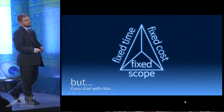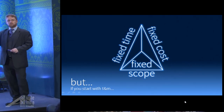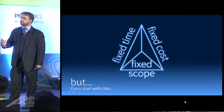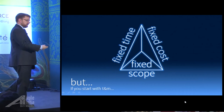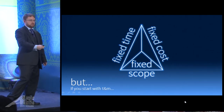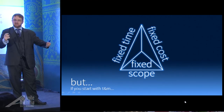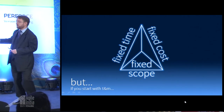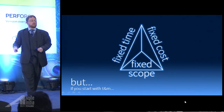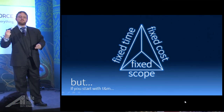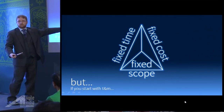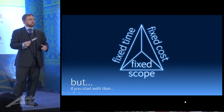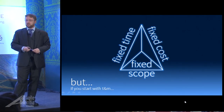There is a silver lining. If you start with time and materials — do a small T&M piece of work, capped to a couple of weeks or a couple of months — to truly understand the business and the intent of what the customer is trying to achieve, and at the end of that if you decide not to go ahead, that was probably the best decision. If you do decide to go ahead and they still want everything fixed, you've built trust over those months and you now have a lot more confidence in understanding what they want, how long it's going to take, and you can calculate those costs. Negotiate some level of flexibility in the beginning.